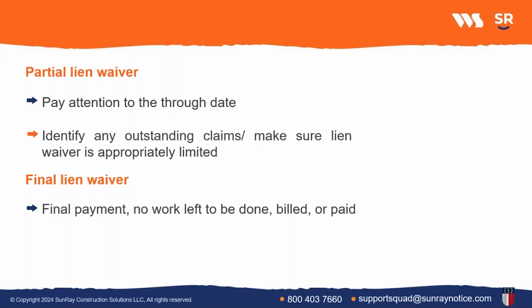So it's important, if you are signing a partial lien waiver, that you pay attention to the through date. So for example, imagine that you did some amount of work and you finished that scope or that phase on Monday, and you billed for that finished work on Monday.